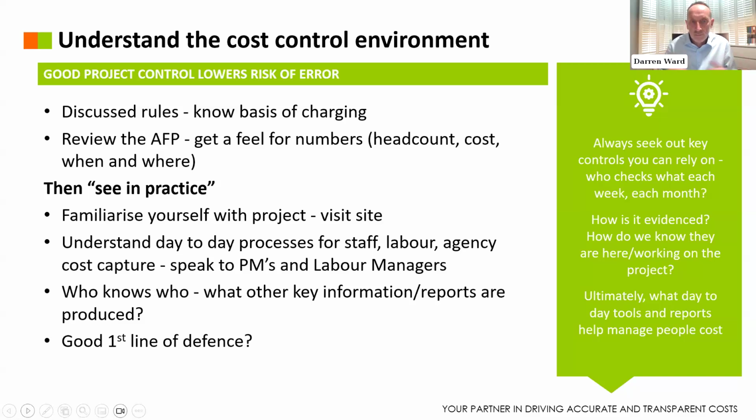So firstly, visit the project, contract, visit the site, understand the day-to-day processes, speak with key people, project managers, labour managers, understand how the staff workforce, the labour workforce, agency, etc., how costs are captured, managed, what key reports are produced on site.